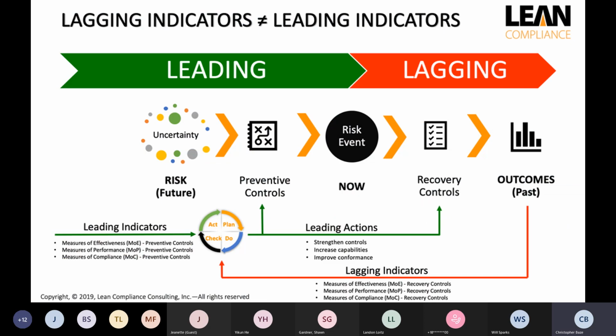And a lot of what we look at with Oracle, and regardless of the software that you're using, is leading and lagging indicators. The lagging indicators are what's happened in the past and gaining insights from it, and leading indicators are ways to predict what's going to happen in the future. You hear a lot about these indicators in safety through OSHA and construction job site safety. The lagging indicators would be your incident rates, what's happened on job sites. The leading indicators would be things like safety training, safety tests, PPE, things that you can put in place to prevent the occurrence of a future incident.